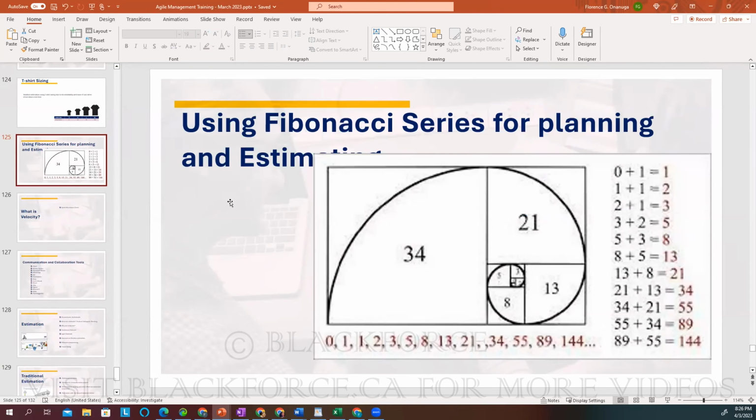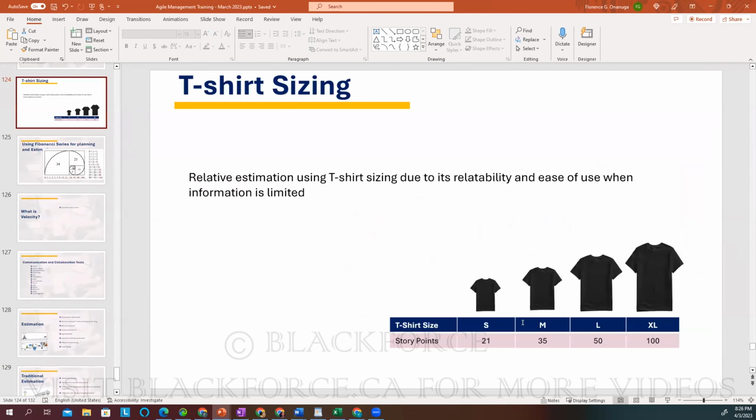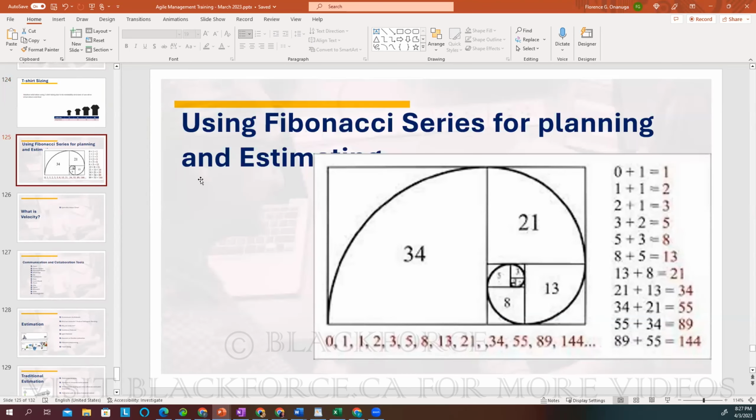These are story points. Some teams will use small, medium, large, and they will put a story point value on what small means, a 2, medium, a 5. If you watch the video we watched last week, you can see their small was like a 2, their medium was like a 3, and their large was like a 5. Organizations will place that, and they use that to estimate. Different organizations can use different things.